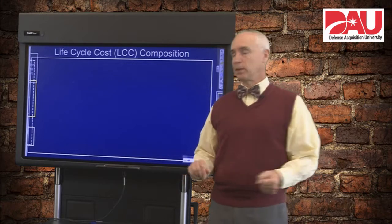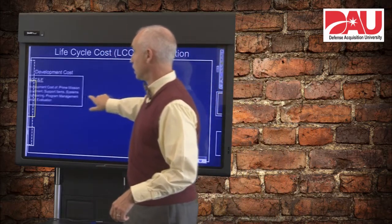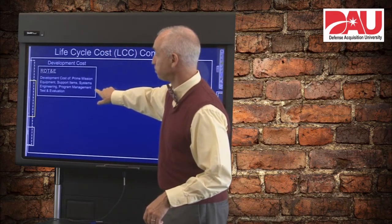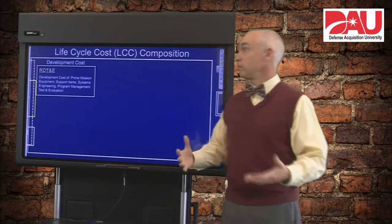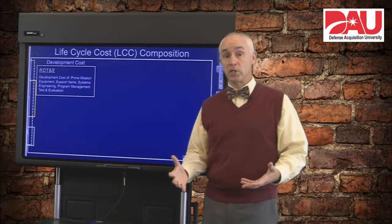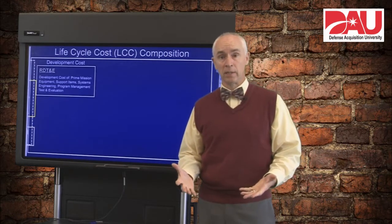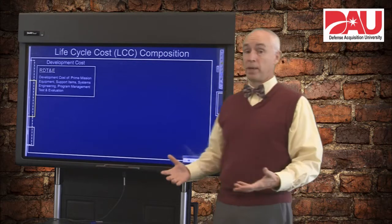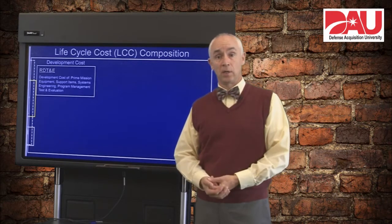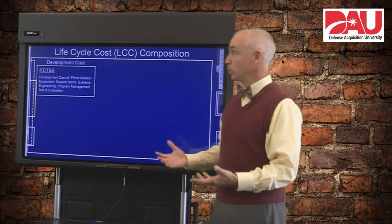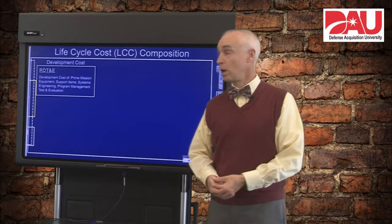So let's start with development costs. The cost to develop a system are mostly, if not all, one appropriation — that's Research, Development, Test and Evaluation, or RDT&E — and that's everything that we pay to design, develop, and test our systems. So that's the appropriation that we use for that, and those are referred to as development costs.